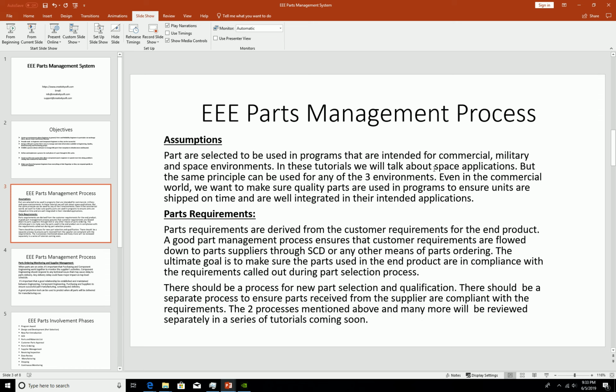All this can be avoided by not creating a new part in the first place, if you can. So that's why you have to have a system in place to make sure that before you introduce a new part, you search your system. We will go through that because there is a system, there is a process. It's part of the new part introduction process.